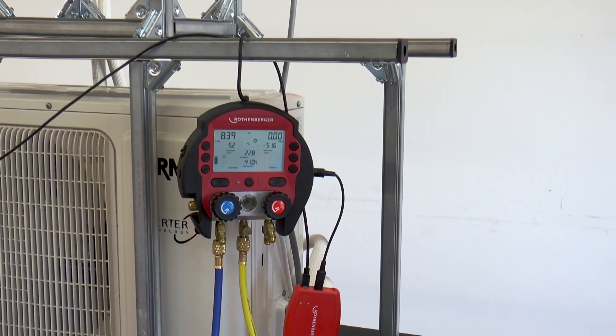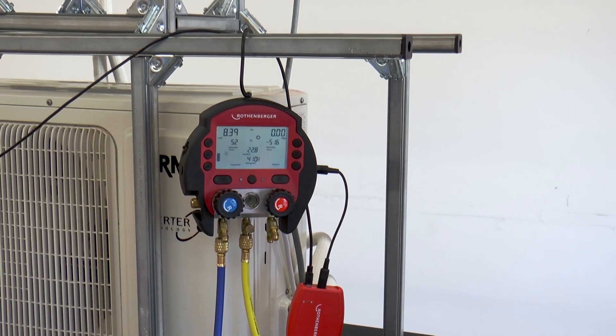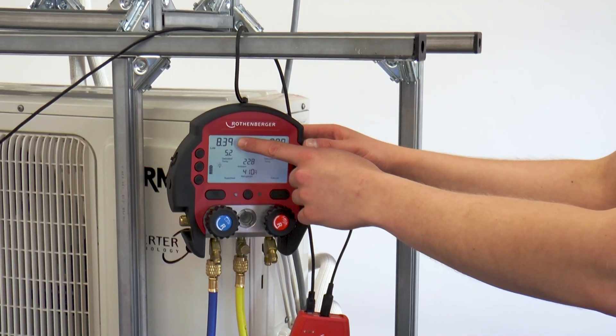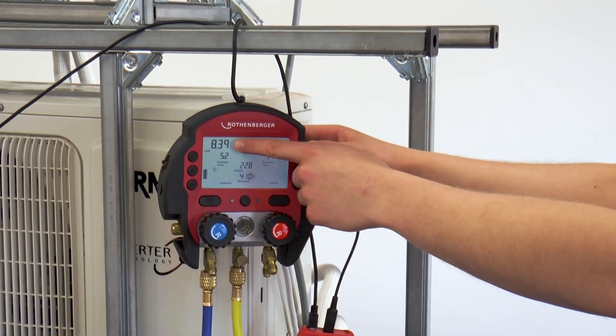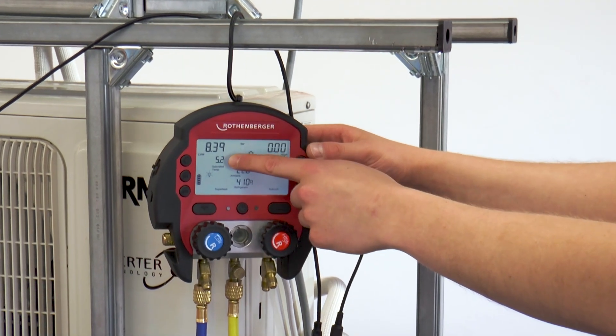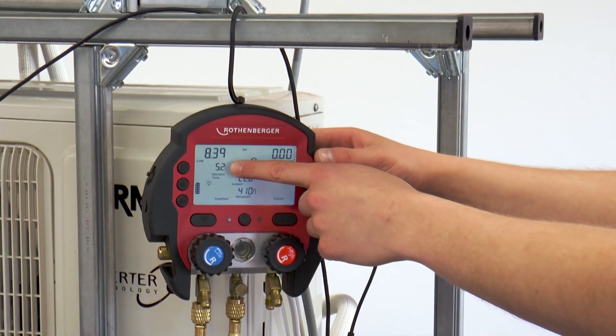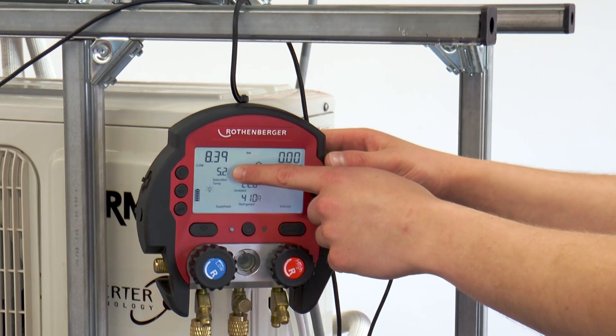After this load test, the leak test is performed. How is the working pressure selected? From the air conditioning application, it is known that temperatures on the low pressure side of zero to approximately plus 10 degrees Celsius are to be expected.